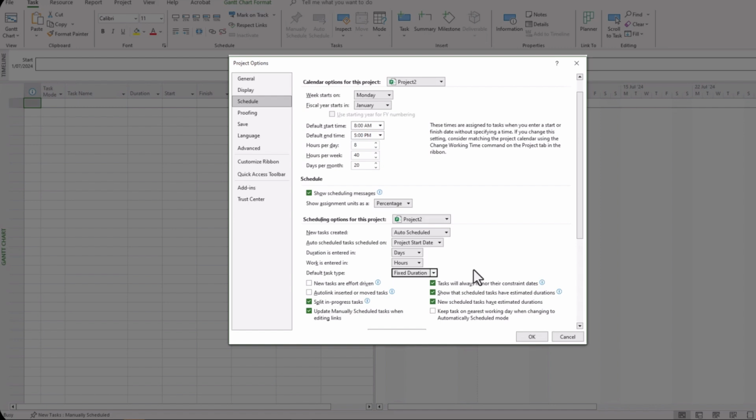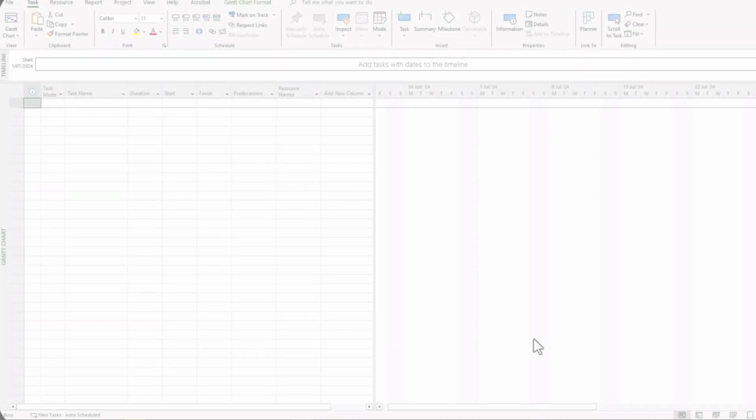If you were to add another resource to that task, if in fixed units and in effort driven, project will, on your behalf, make an adjustment to that duration, and you might not be happy with that. So if you're more comfortable with keeping the duration of your various tasks fixed, giving you more control, then you certainly want to ensure that you choose fixed duration. So auto scheduled, fixed duration are important considerations for you to do in that upfront work.